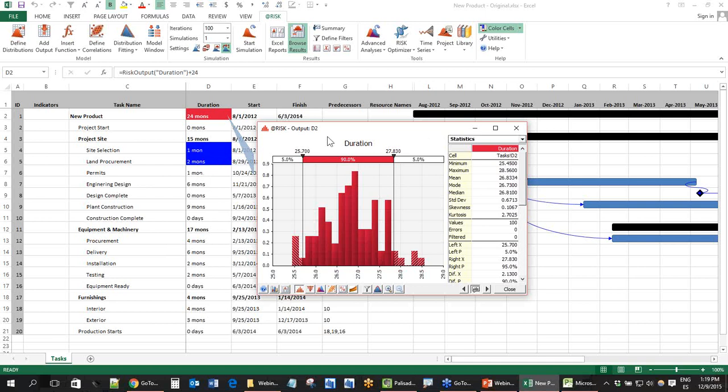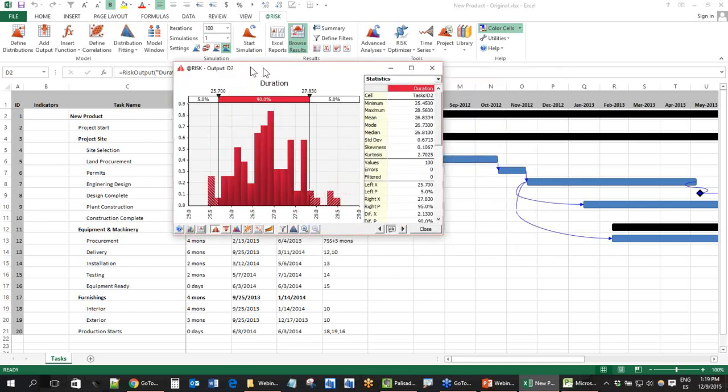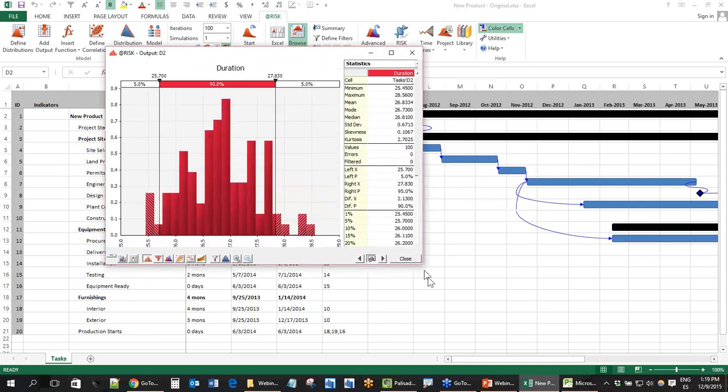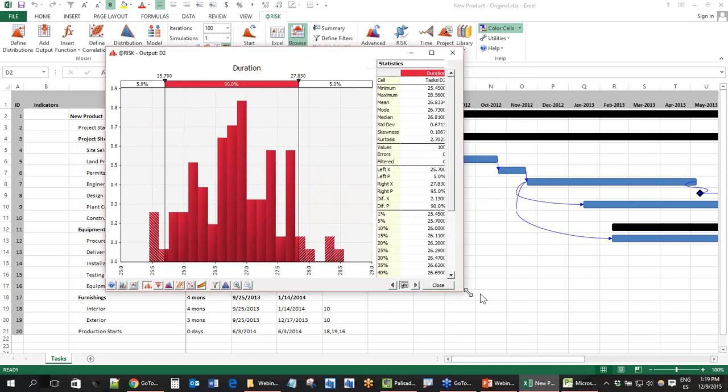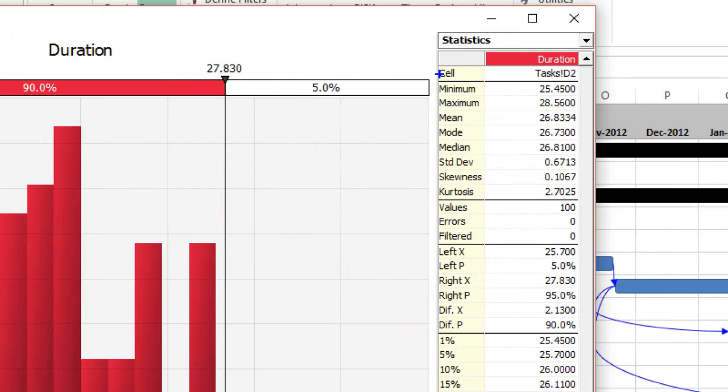So what happens is that I ask for 100 iterations. That means that from these 2 distributions, I grab 100 samples, I send them, recalculate the total duration, and I have this distribution for my results. And what this distribution says, and then you will start to see the value of it, is that I will take, this is in months, from 25 to 28 months to finalize my project. You see? I have more or less 3 months of variability. The expected value is 26 months, right?